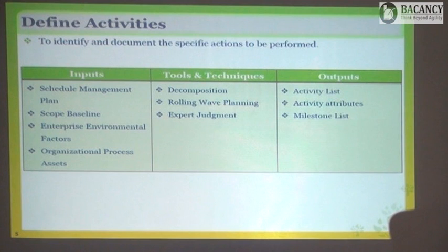If yes, was it ready on time? Okay, fine. What happened? Why was it delayed? And have you ensured that the other pieces will not get delayed? So every work package must have a milestone which will mark either the start or completion of that work package. You can have one milestone or you can have two milestones, but it must contain at least one milestone.